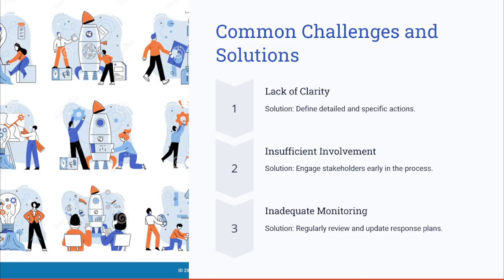Here are the common challenges and solutions when creating a risk response plan. Common challenges in developing risk response plans include a lack of clarity in actions, insufficient stakeholder involvement, and lack of monitoring of these risks. And these can be addressed by defining detailed and specific actions, engaging the stakeholders early, and regularly reviewing and updating the response plans to maintain their effectiveness.